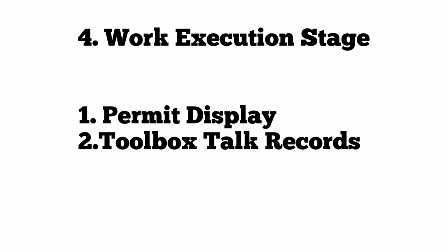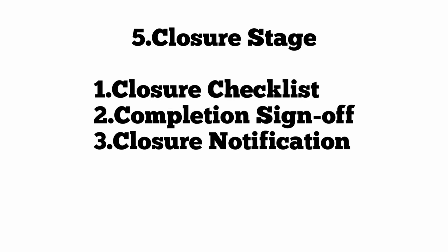During the work execution stage, we must display the permit and must maintain a toolbox talk record also. During the closure stage, we must maintain a closure checklist, completion sign-off log, and closure notification.